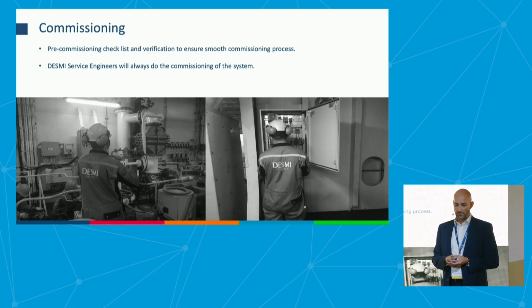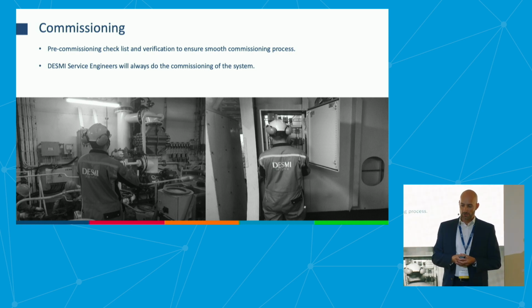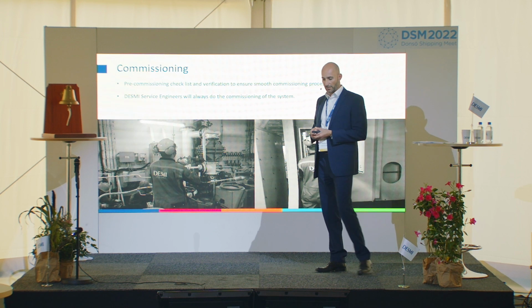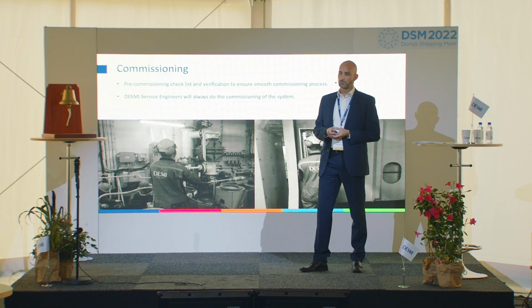So we try to the best of our ability, and I think we are succeeding very well, to do a proper commissioning. We have our own DESMI service engineers. We always use our own DESMI service engineers to do the commissioning. They are highly trained. They participate in a number of commissionings before they are allowed to do a commissioning on their own, so that they are always experienced when we send them out. And it is working quite well, and I can say that last month, in the month of May, we did 85 successful commissionings in one month.